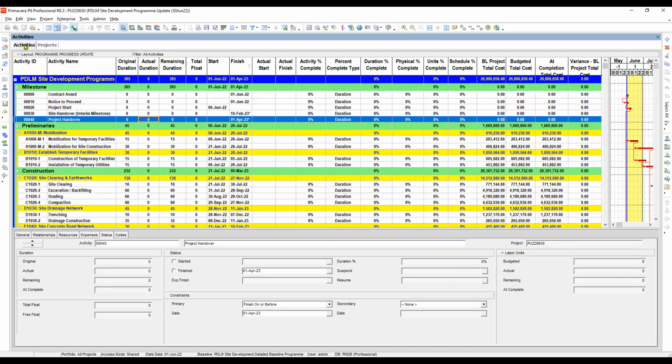So as I said, link actual to date and actual this period units and cost. This is to be able to input actual data in the resource assignment. This period actual units and the actual to date units will be calculated accordingly. So also let's review the schedule options.